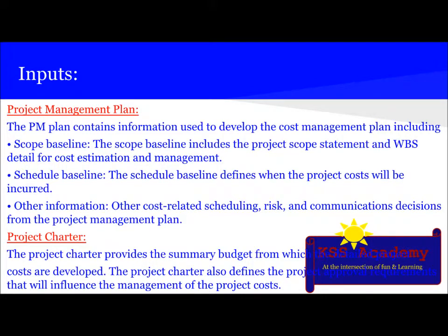The next input is the project charter. The project charter provides the summary budget from which the detailed project costs are developed. The project charter also defines the project approval requirements that will influence the management of the project cost.